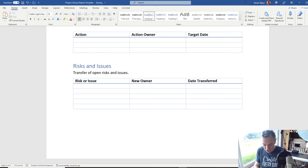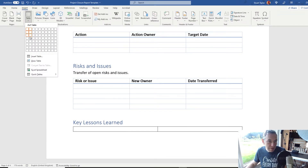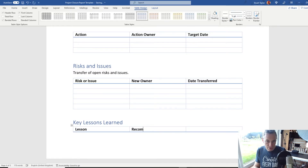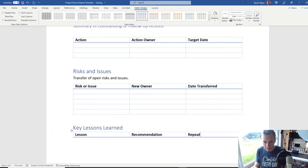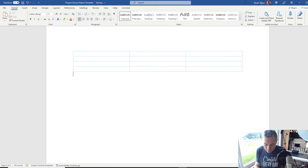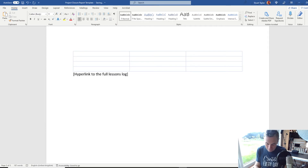Go back to Heading 1 for a new section called 'Key Lessons Learned'. Insert a simple table with columns: Lesson and Recommendation. We're only putting the key lessons here — there should be a full Lessons Learned library somewhere else in your records, and you just need a hyperlink at the end of this table pointing back to wherever that exists. You don't need to replicate the entire content. I'm also going to add 'Repeat' and 'Avoid' columns — that's optional. Underneath the table, make a recommendation to add a hyperlink to the full Lessons Log.